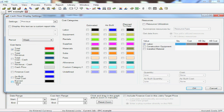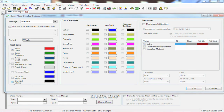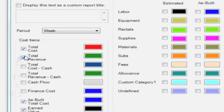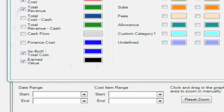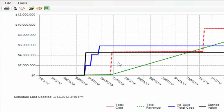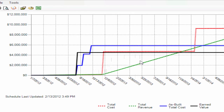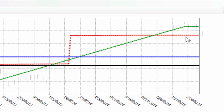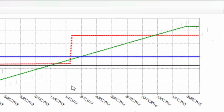We can not only project how we think the costs are going to look over time, but as the work continues and progresses, we can actually trace how it really went. Let's turn on our revenue as well, so we can see when our revenue is going to be kicking in — if we're the contractor, we might want to see when we collect our money. Let's turn on both the as-built cost and earned value lines. Now we're going to get quite a few lines on the graph. Comparing the red and green lines, there are moments in this project where our cost exceeds our revenue. We're collecting revenue on a fairly level basis, maybe once a month, every two weeks. There are periods where even though we end up with revenue above cost at the end, there are interim periods where cost is above revenue — good thing to know if we're trying to make sure we've got financing in place to cover this project.